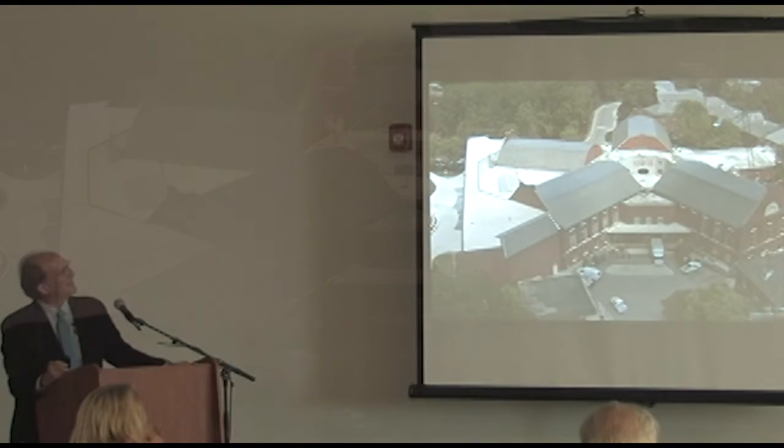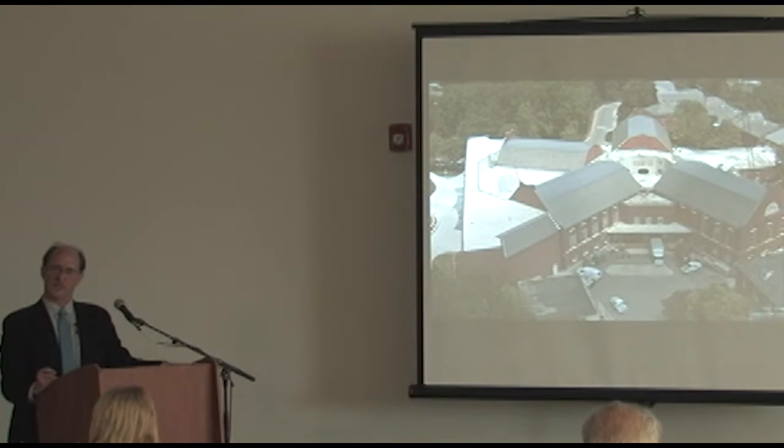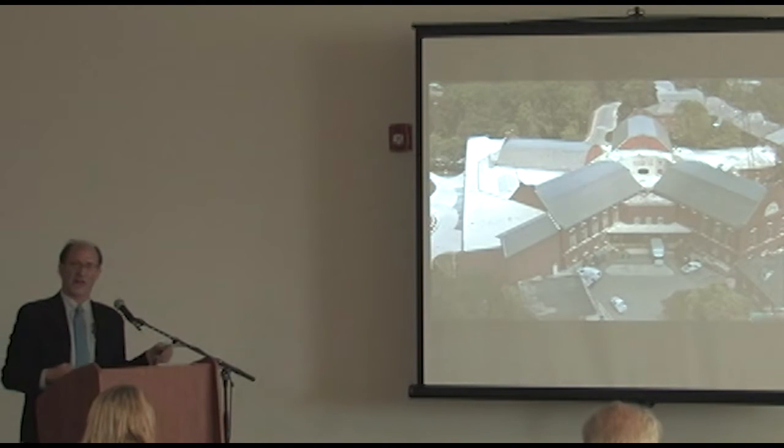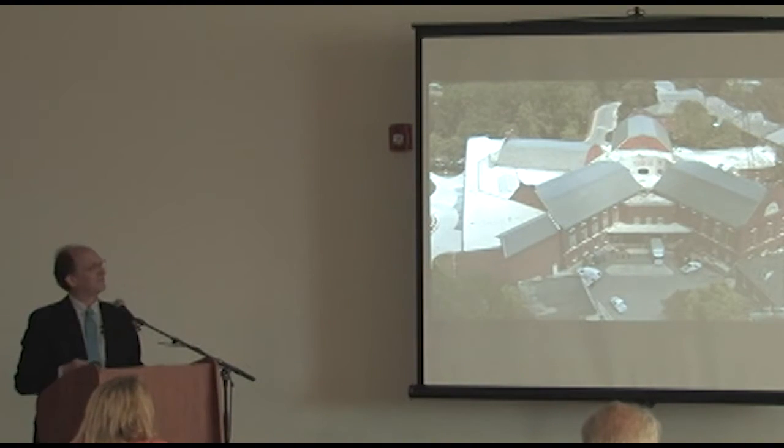So here, that center ring of walls is in the zone where we want our future dining to be. So it's still there, but you see we left all the roof around it, and that roof stayed there until after this new roof was constructed over. And that had a lot to do with the phasing of the building. Part of the design allowed us to basically drill down through for 10 columns, construct this roof over it, and then demolish the old structure out from underneath it. That way we could keep this thing waterproof while it was still occupied while the construction was going on.